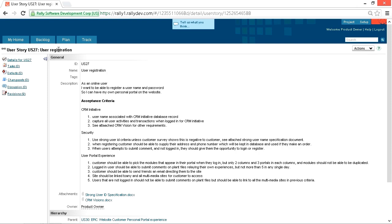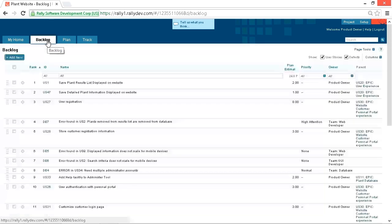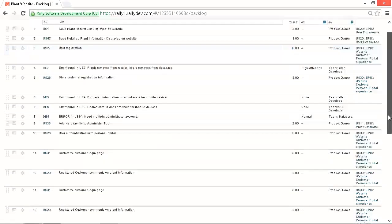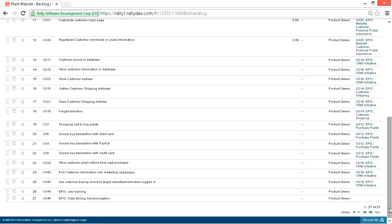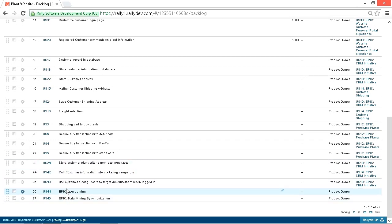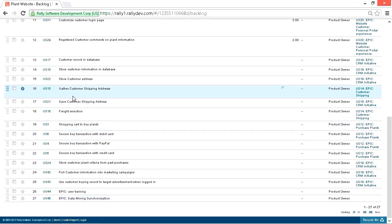If we go back to the backlog, I'd like to point out that splitting user stories is a deferred activity. Stories at the bottom of our backlog here are going to be very large and fuzzy with very little detail. We have some epics, we have some large user stories. And that's fine because these are low priority. We're not going to be working them anytime soon, and we really don't want to waste time defining them because as they move up in the backlog, as time progresses, the whole project could change, the customer focus could change, and these could change. So it's okay for them to be fuzzy and large down here.